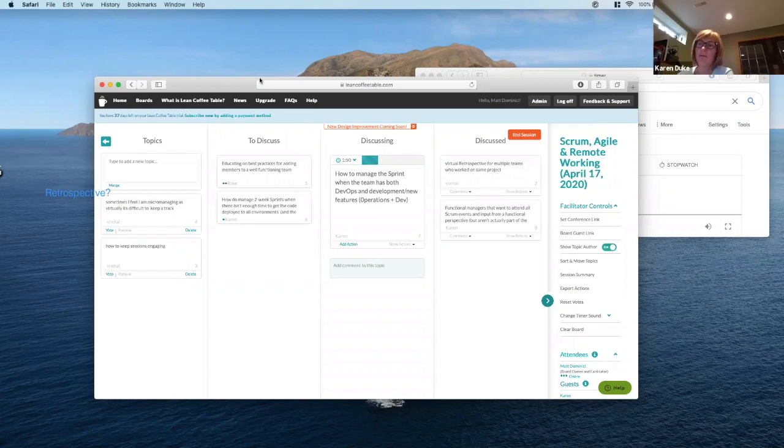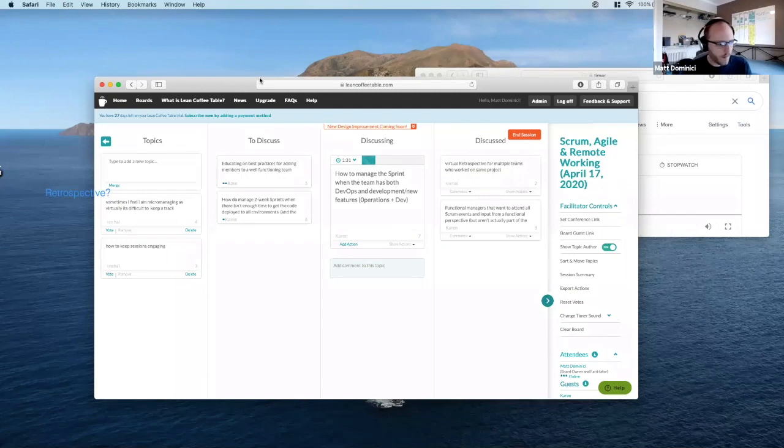What about if it's not a production issue? What about if it's just plain doing research and investigation before they can actually move forward with a new functionality? Yeah, so for those, that's definitely a little bit different than operations type work. One of the common ways of handling that is just by putting spikes in the backlog, right? Right. Okay. We use spikes as a product backlog item, and there's probably a few different ways to approach it. The two most common ways that I see is you estimate it just like however you're estimating any of the other work that you're doing, and it just becomes part of the work.